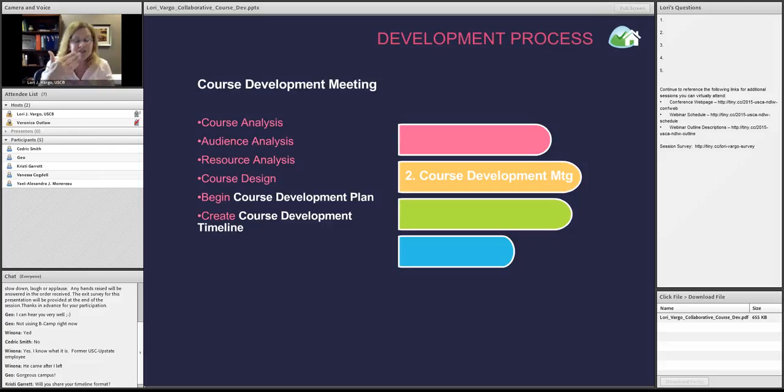They have to have a completed development plan, and we have to have a timeline in place before they start. Yes, I will, Christy. I'll share, yeah, that's a great tool. I would be delighted to share that. They have to have the timeline available. Even if we don't have all of the minute details about my course builder getting their job done, at least they know when they have to turn in all of their documents.